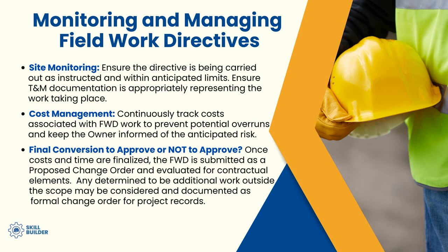The biggest issue that comes with this is people just continuing to do the work until they think that the work is complete, instead of working to the limits of the monetary ceiling that has been put on this scope of work.